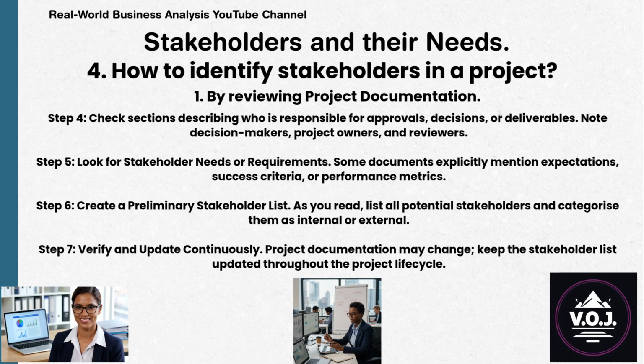Step 6. Create a preliminary stakeholder list. As you read, list all potential stakeholders and categorize them as internal or external. Step 7. Verify and update continuously. Project documentation may change. Keep the stakeholder list updated throughout the project lifecycle.